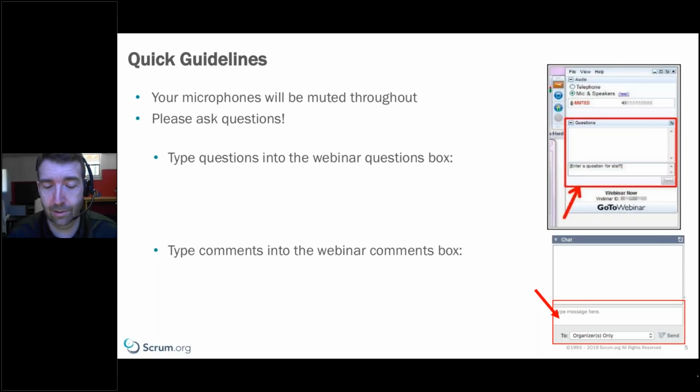But as a practical cadence, you begin the sprint with sprint planning, just as you said. At the end of your sprint time box, then you conduct a review, and I conduct the retrospective after the review, because there's more learning that happens in the review that you want to retrospect on. So that's the order that I always prescribe. But when you have a certain special thing, then you have to adapt to that. So I'm confused as to why the questioner would consider alternate orders. Was that clear at all to you, Eric? It wasn't. It was more looking for just suggestions and recommendations.